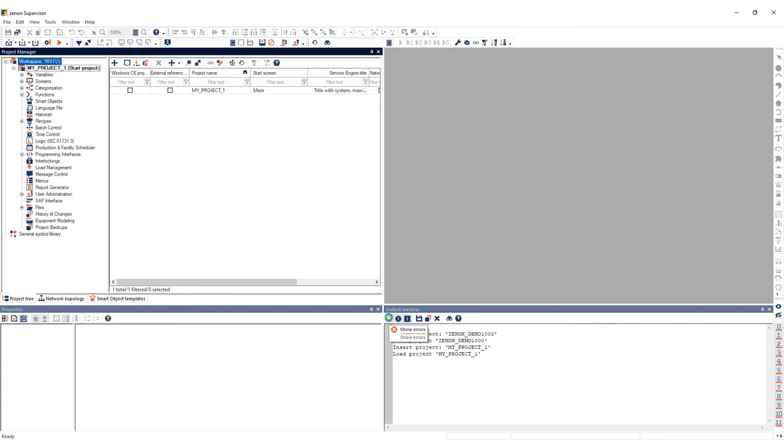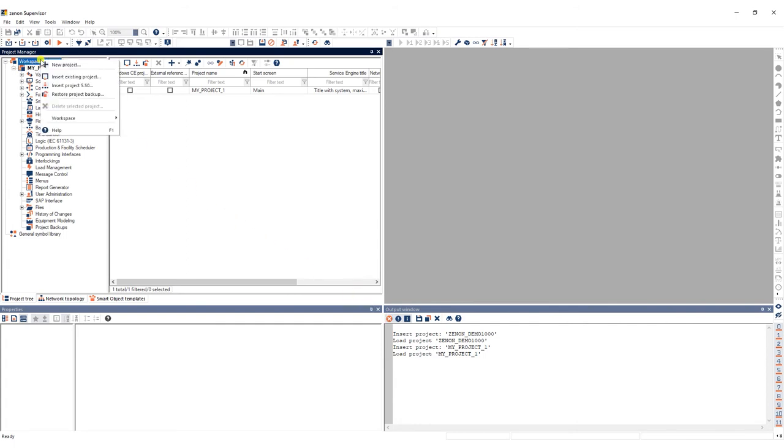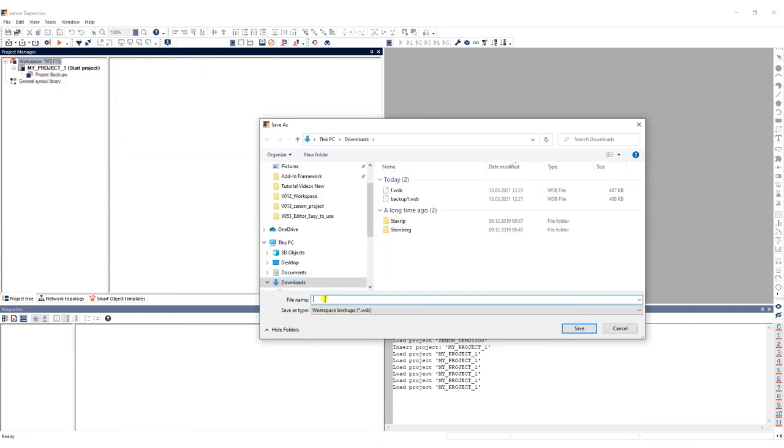It is highly recommended that you regularly backup your workspace. To create a workspace backup, right-click on the workspace in the project tree, go to Workspace and select Create Backup. Enter a name and click Save.